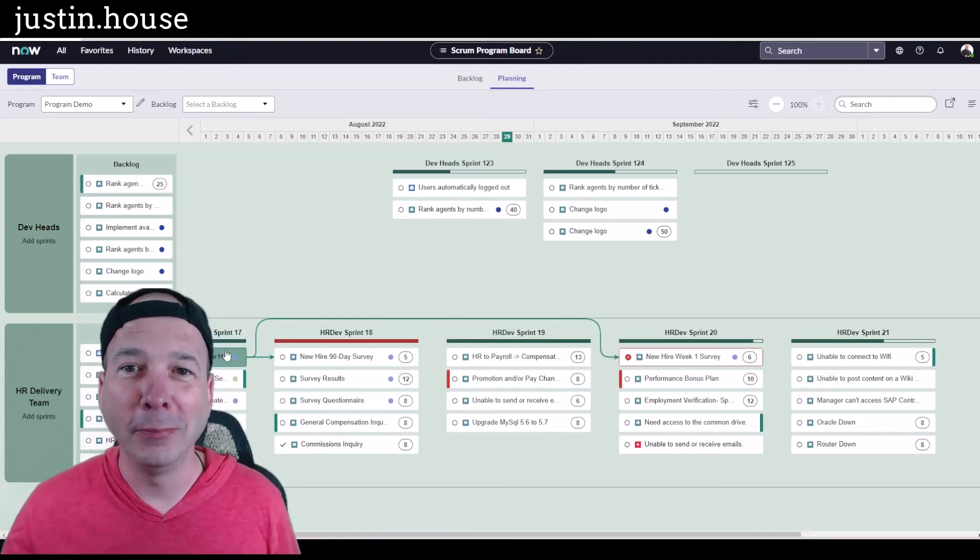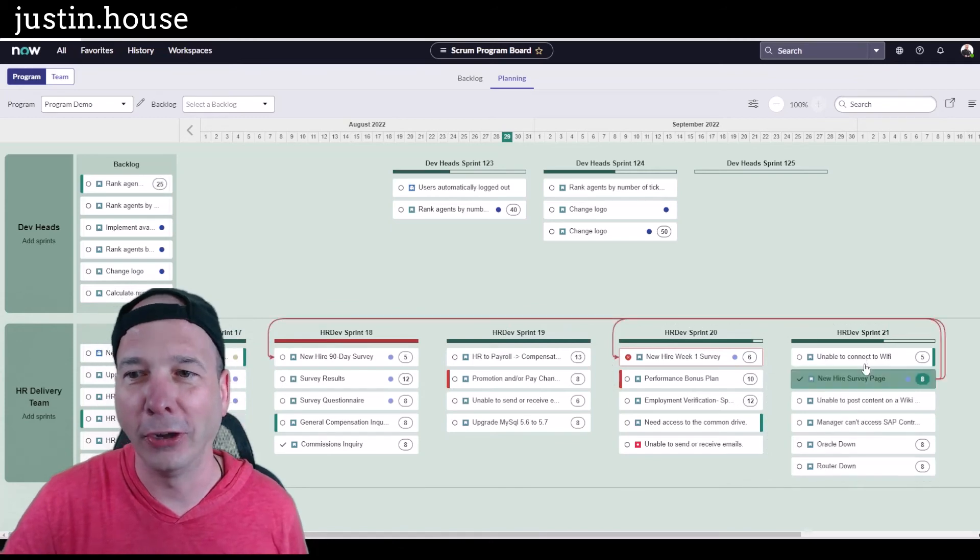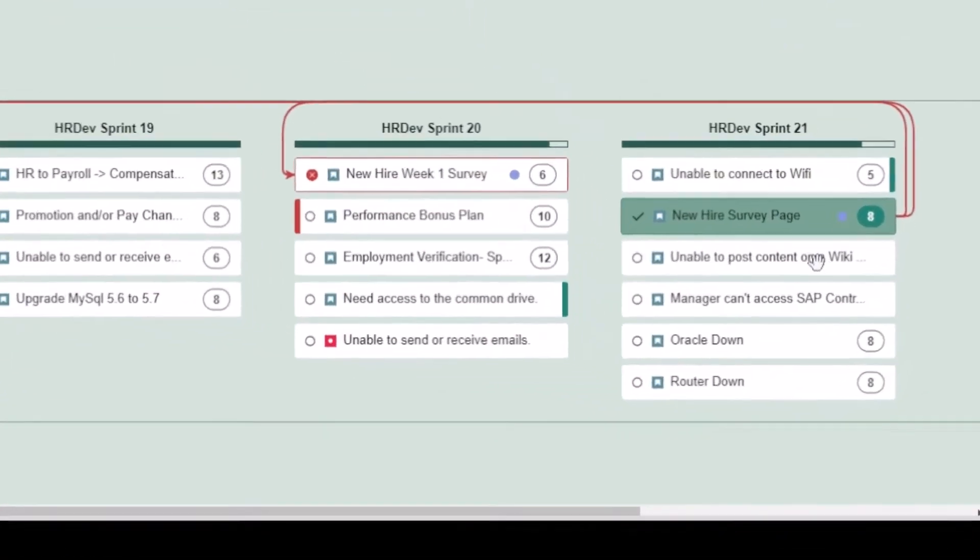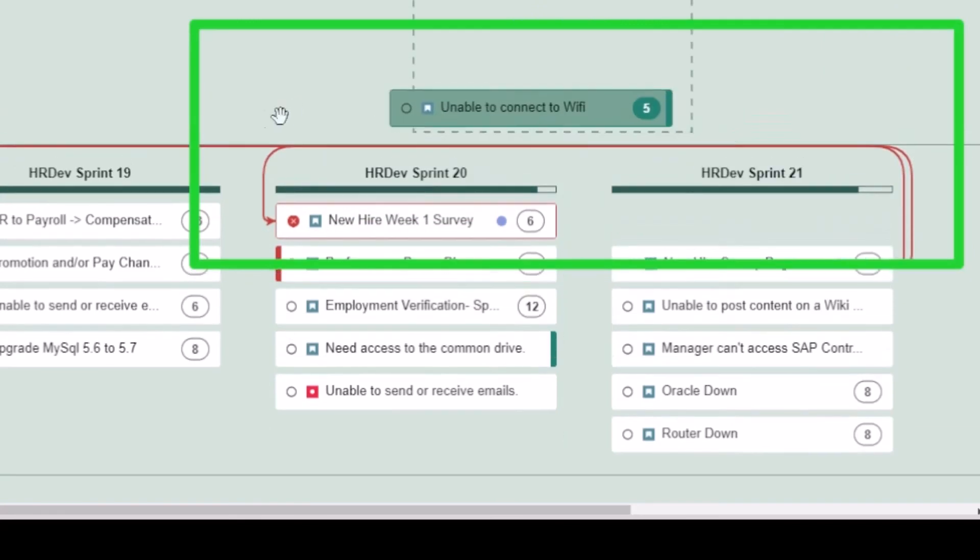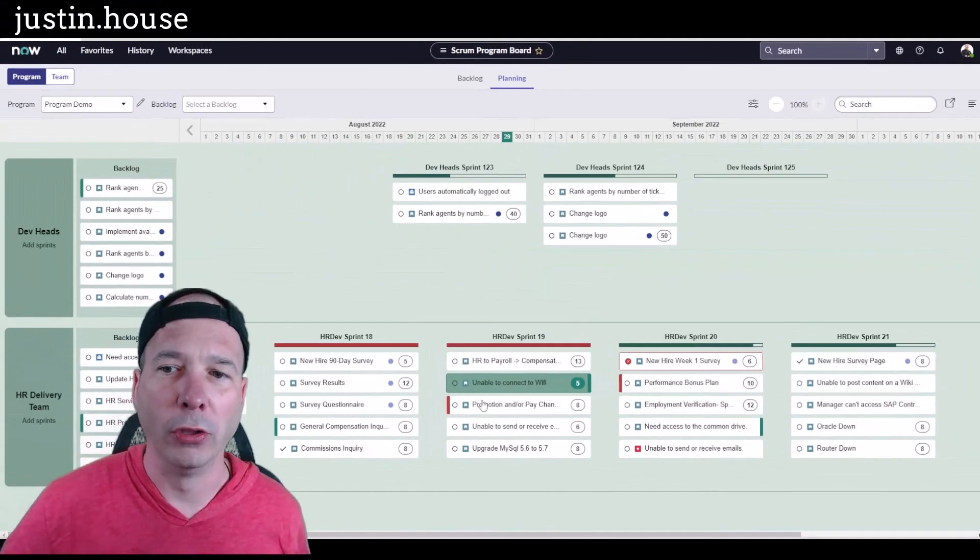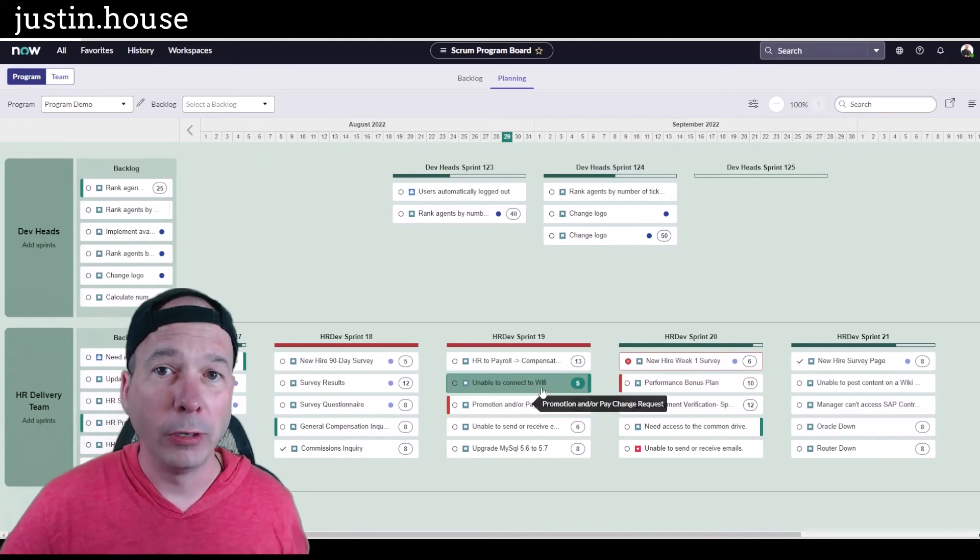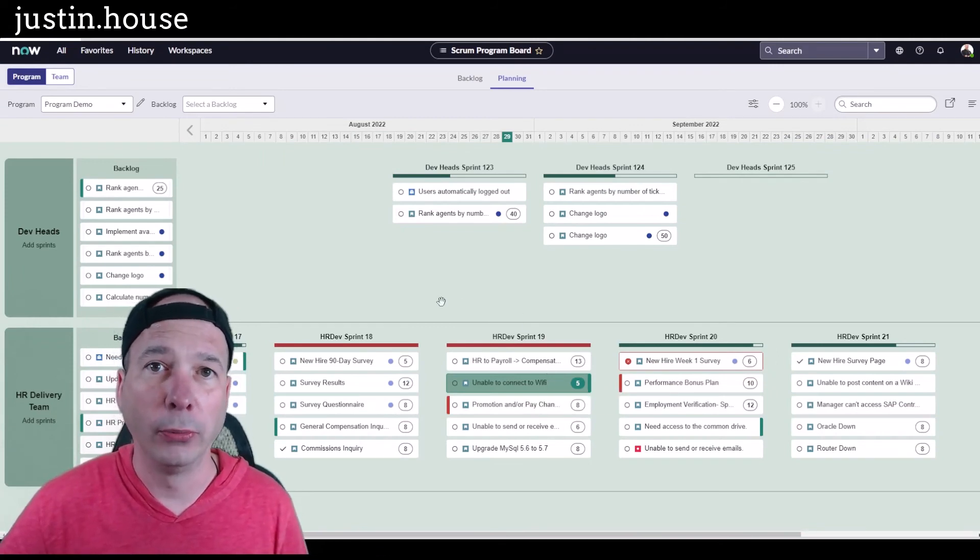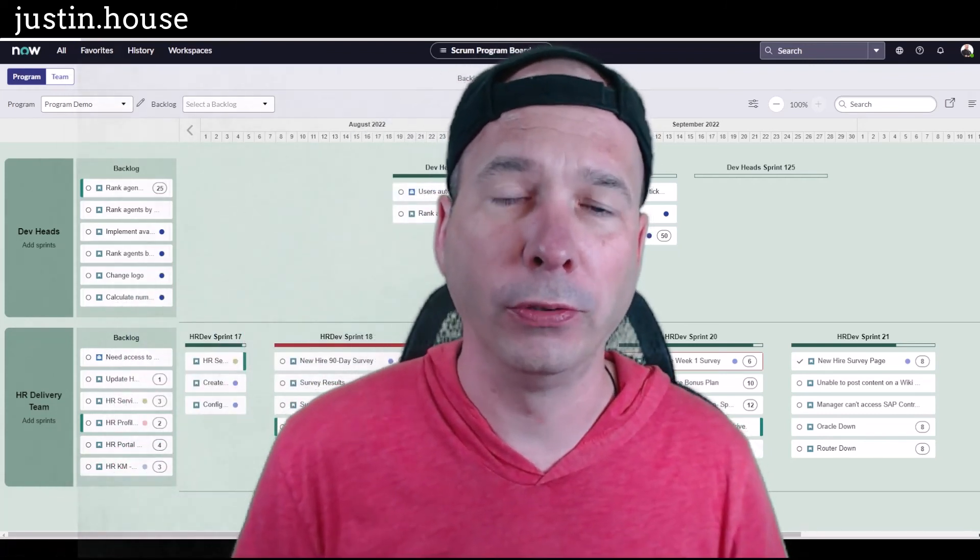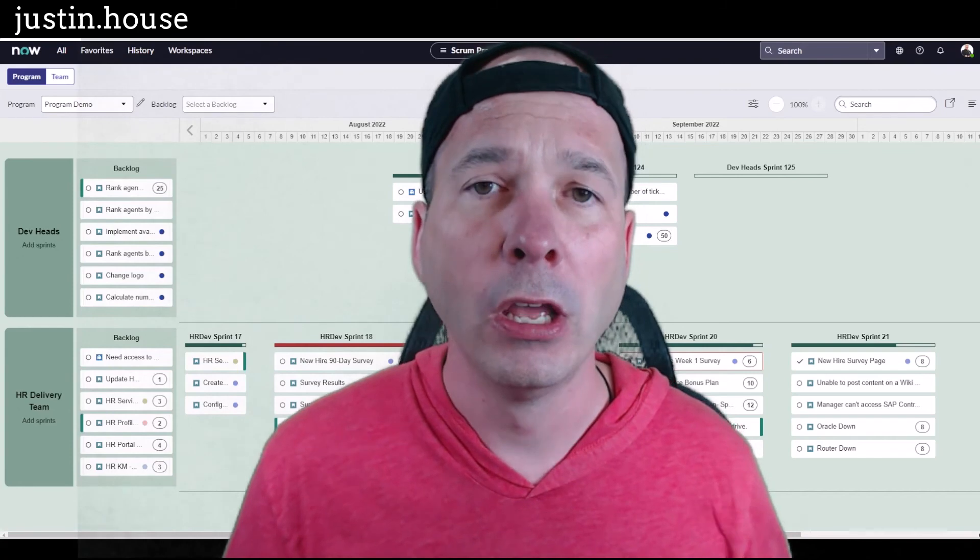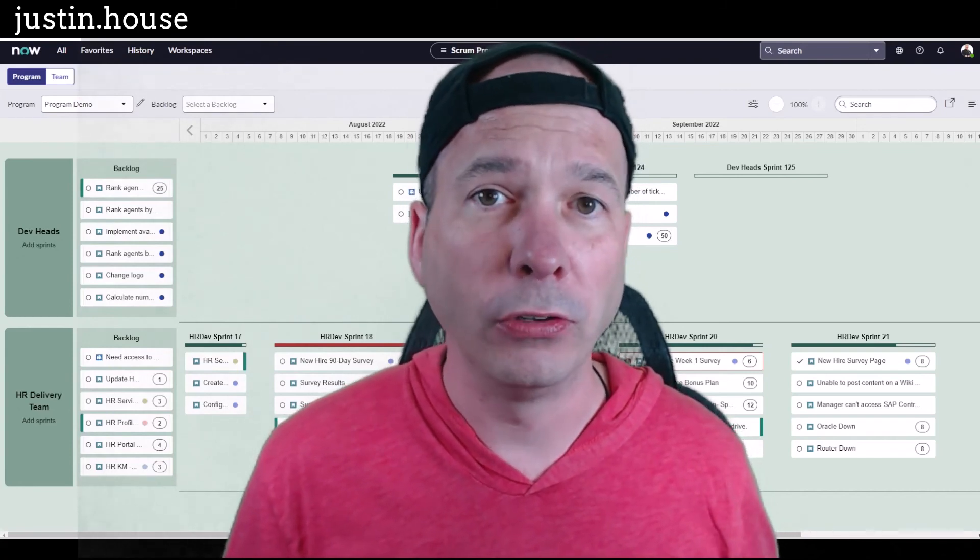If I did have them out of order like you saw me do by accident there, it will turn that line red showing that one is happening before the other and you need to reorder your sprint. So there's out of order it being red, here's me grabbing it and putting it back in order so I get a green dependency between those two things. That is sprint planning in ServiceNow. They make it easy, they make it simple as a product manager, as a backlog manager, to get those sprints filled up to capacity and take care of your dependencies between stories in a particular sprint or between stories between teams that are working on different things.